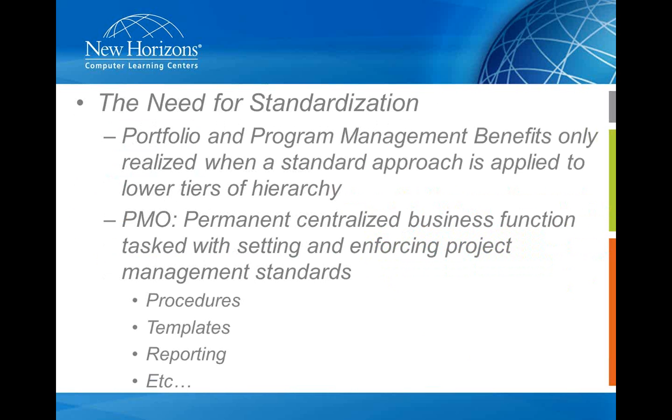Imagine that for a second as a program manager. If my job is to make sure all the projects in the program are meeting the goals that they're set forth, to make sure that the program as a whole is helping to hit those strategic goals, if I'm going to be tracking long-term benefits, you know what's going to happen? Guaranteed. Something's going to change while that set of projects is running. I'm going to end up having my budget cut or my time frame cut. And now I need to do something about that with the projects in it. I no longer have the budget I thought I had. So I'm going to have to allocate the money of my program across the different projects within it. Well, to make those decisions, which is what program management does, I've got to bring in the current information, the reporting information of how each and every one of those projects is performing against its goals. I've got to know how we're doing to make an educated decision.